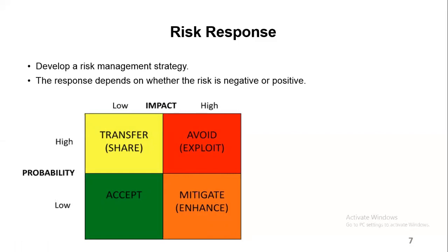Here you contract it out, or you subcontract, or you give it out as a tender. So now they have that risk. For you, it's just to tell them the deliverables that you want from them, but they are the ones taking that risk. Don't forget, when you are working on business, it's just about risk also. So they need to manage that risk.